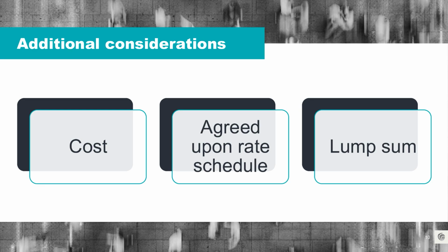For example, if you paid upfront as a lump sum for 4 full-time staff to manage your project, can you confirm, in fact, that all 4 individuals worked on your project full-time? And if you find they didn't, then do you have the recourse to pursue credits for any services you did not receive? This, in fact, is the primary risk here.